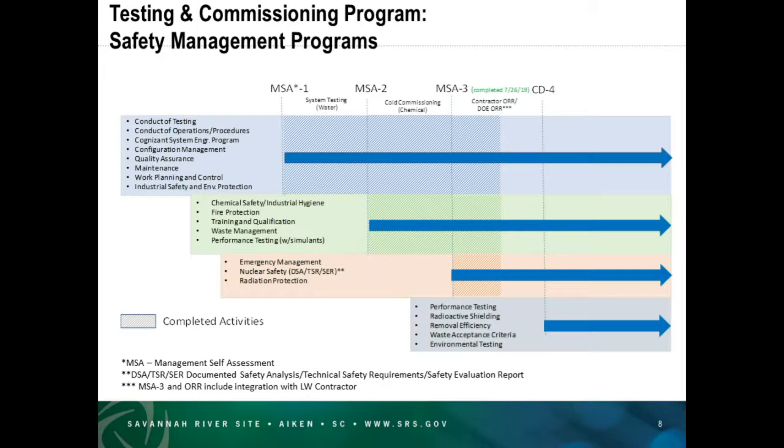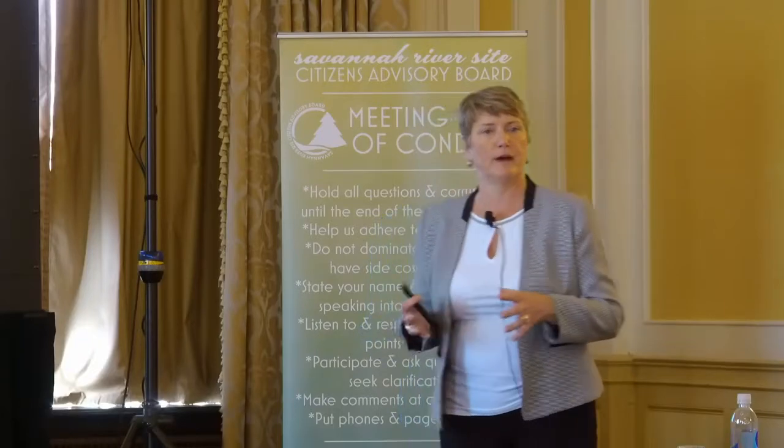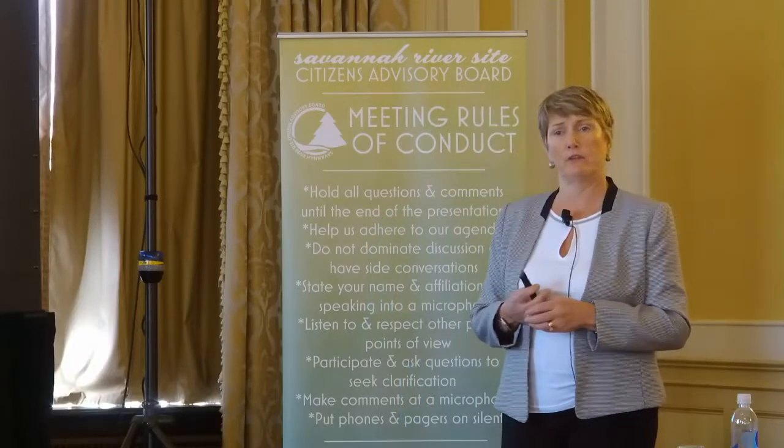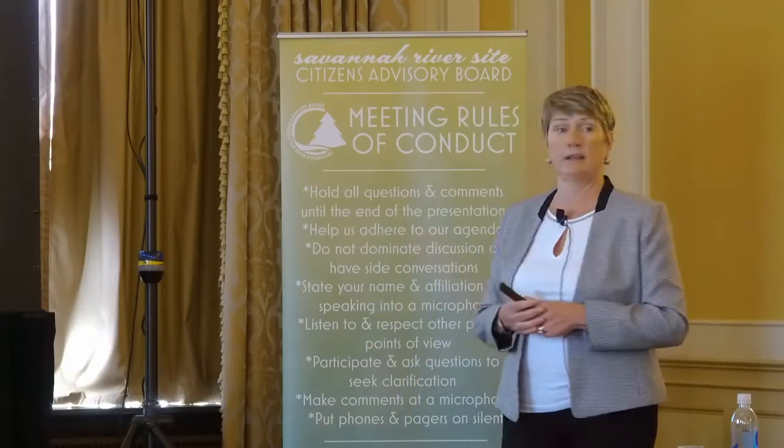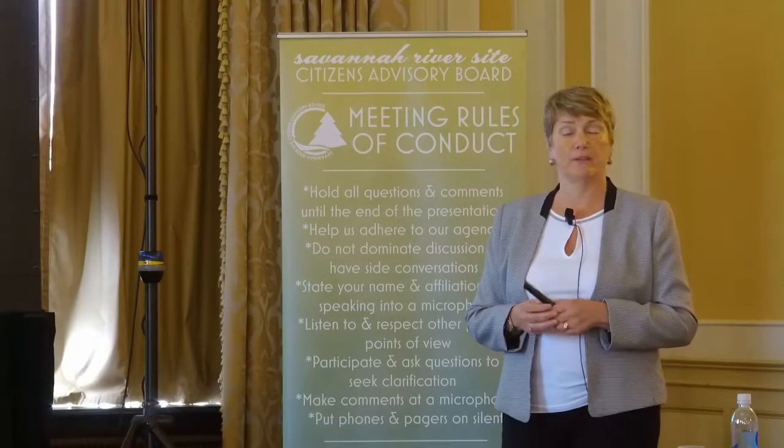That Management Self-Assessment was to give us a feel of how we were standing relative to starting our Operational Readiness Review. In addition to all these things, Management Self-Assessment 3 focused on emergency management, implementing our safety basis, and radiation protection. We are in the process right now of resolving the issues that came out of that review, and also completing the implementation of our safety basis.